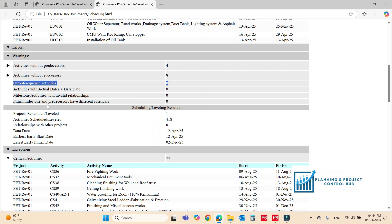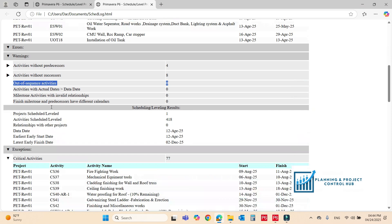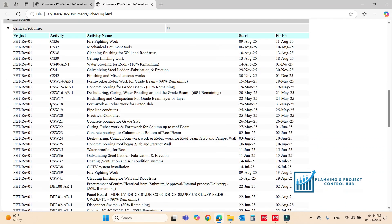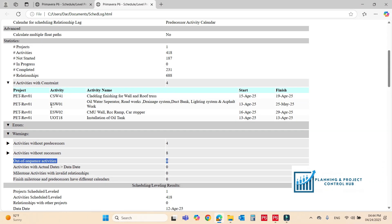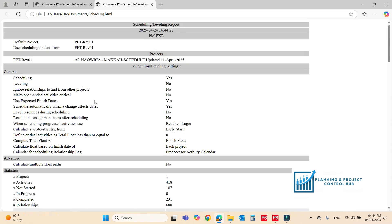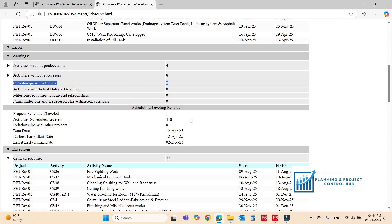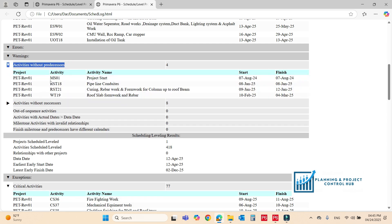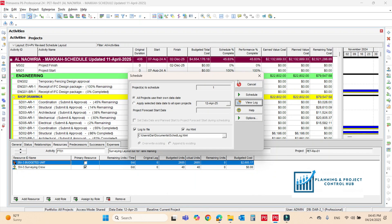At 0. But if you noticed here, here, here we have some open end activity also like this one with the constraints. So you will have to remove the constraints also. And let me check for the open activities. No it's not here because we have seen this one. I told you we have the open activities here. So before submitting the schedule to consultant you also have to rectify the open activities by linking it to the logical relations. So you have to rectify all these.